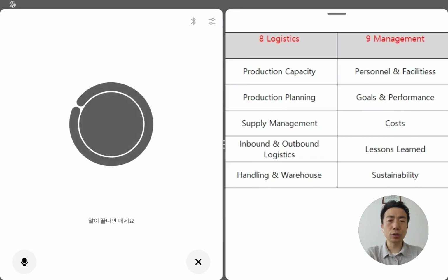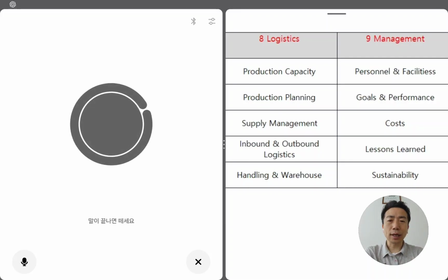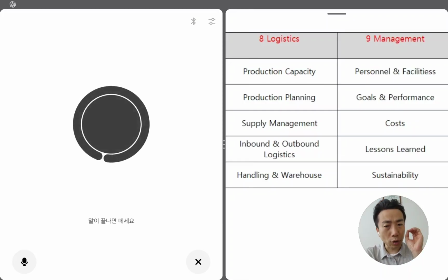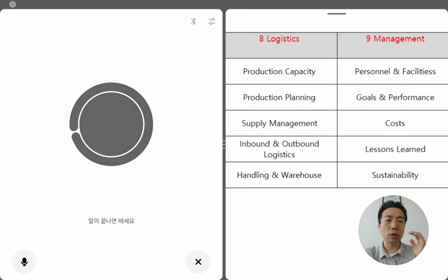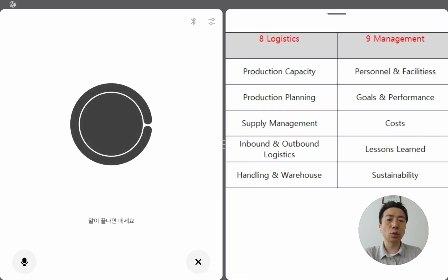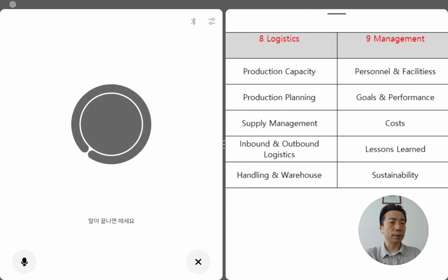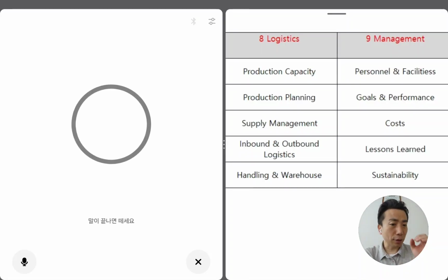They select key issues to analyze further. These selected lessons are documented and reported and shared across departments to support continuous improvement and meet our customers' expectations. This system helps us avoid repeated mistakes and build stronger processes over time. You know, I love the last part. I say one more time: this system helps us avoid repeated mistakes. I mean, recurrence.